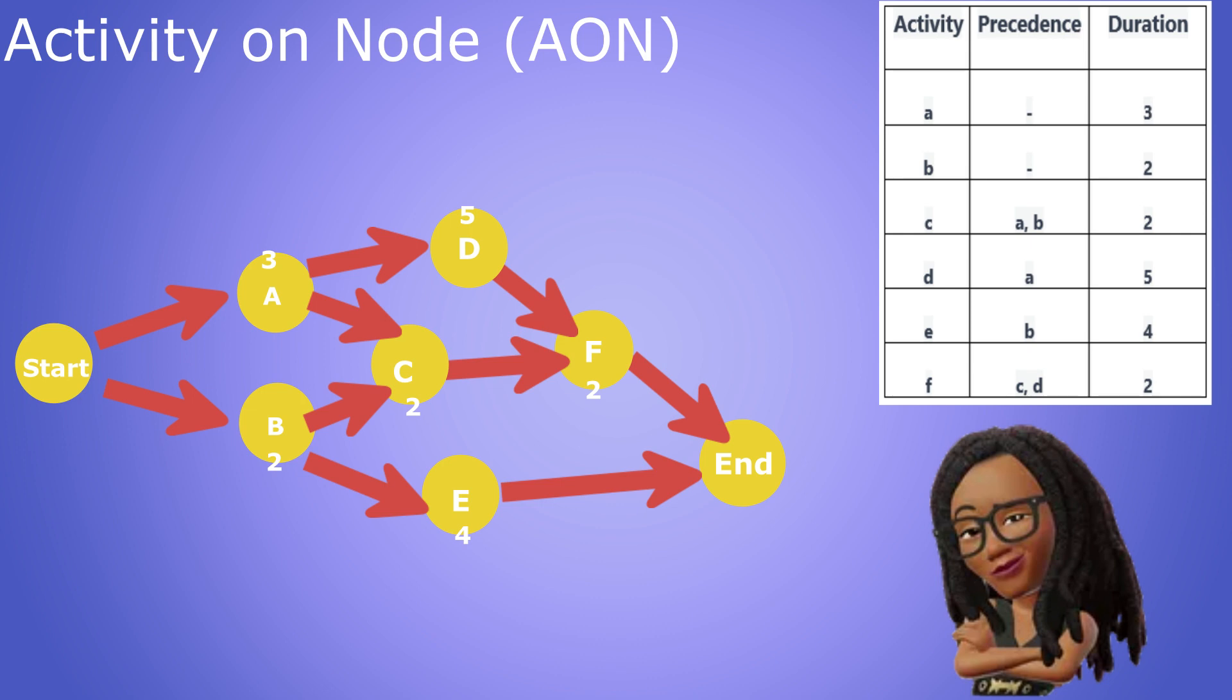In a separate video we will complete what is known as a critical path analysis on this network diagram so that we can calculate the length of the project and determine the earliest and latest times we can start and finish each activity without delaying the project. But for now let's move on to our activity on arrow diagram.